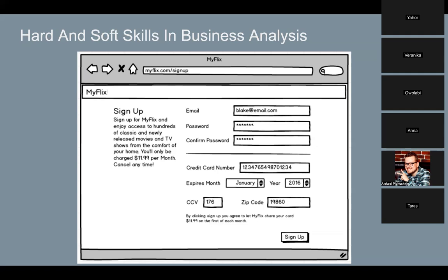It has to be confirmed with the product owner that everything here is correct. And they have to know that this is ready, and the development team should know that this wireframe is ready. Once I, as a business analyst, get approval for this wireframe, I can pass it on to the team so that they can start the development process. And that is why the business analyst, once the wireframe is ready, goes to the relevant stakeholders and says, hey, I have created this wireframe.